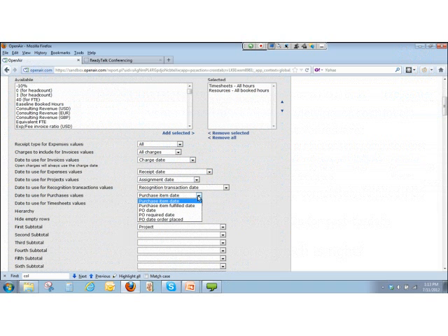Fulfilled means completely fulfilled, means the entire PO has been used up. So if you use the purchase item date, you can include the full date of the purchase item, but there's no cost against the project. If you use the fulfilled date, it will include all the cost of the purchase item. But if you have a partially fulfilled purchase item, a purchase request, you won't be able to include the accurate value on the report, just to let you know.